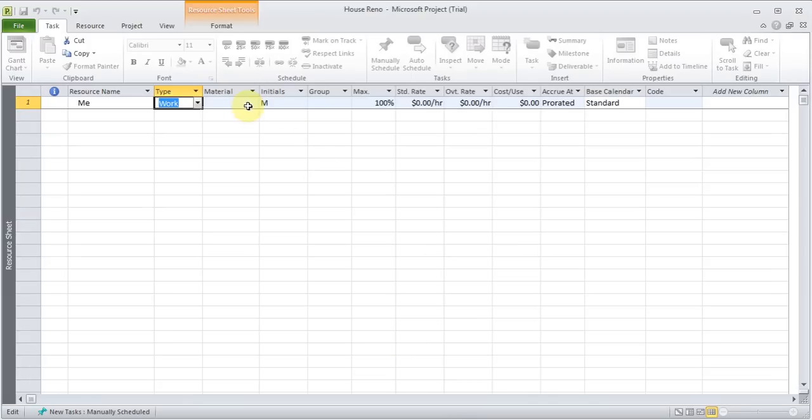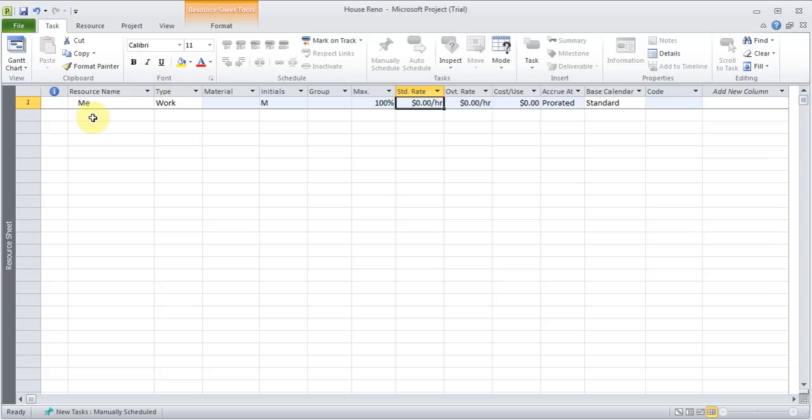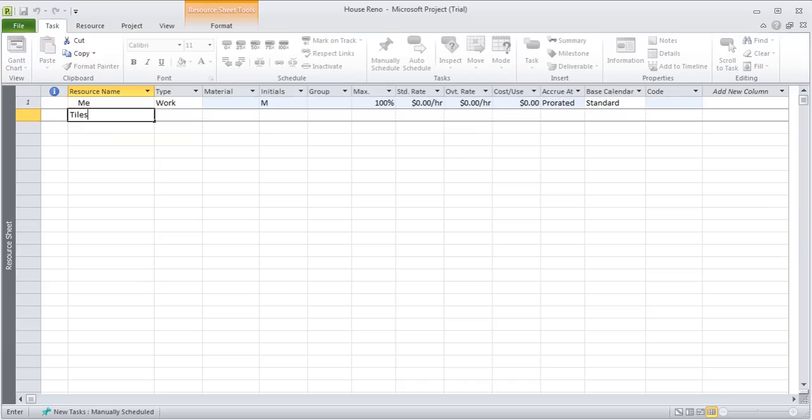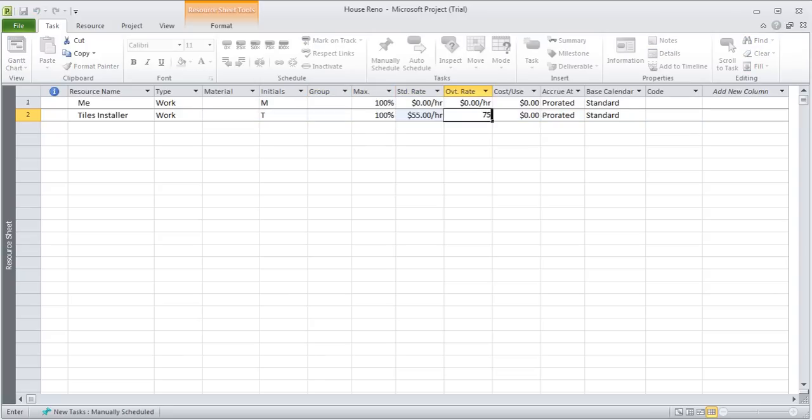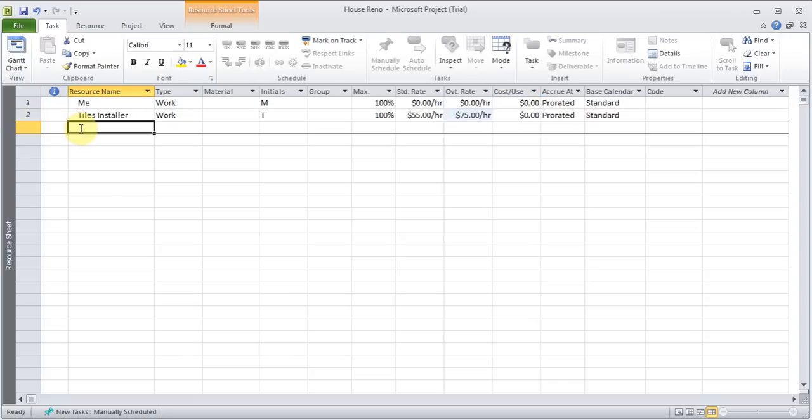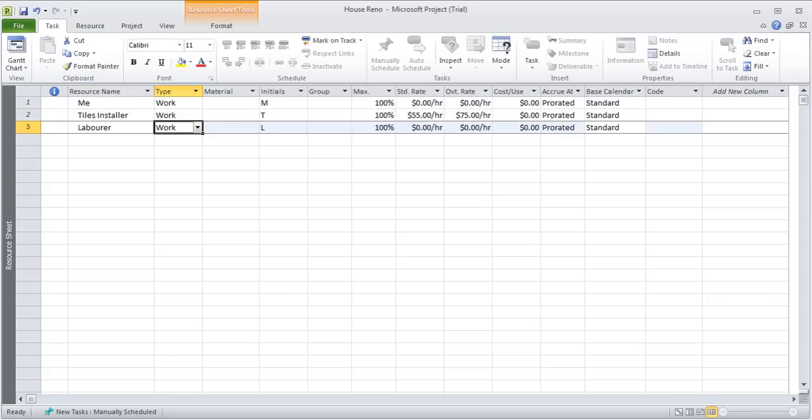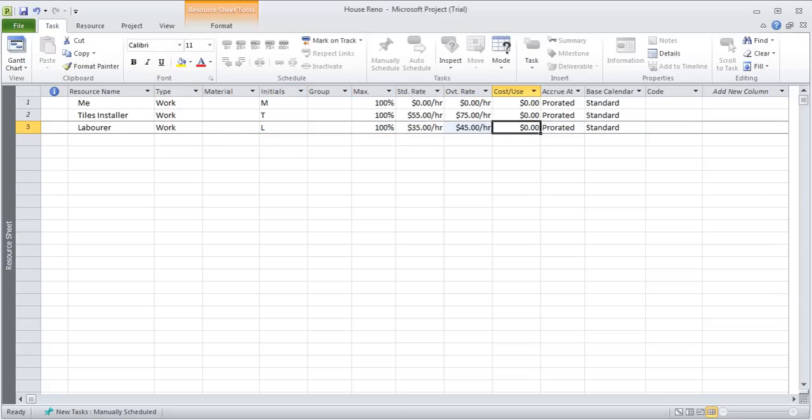Come back. So me, at least for now, I'm not charging myself anything. But if you wanted, you could put something there, so that you know, if you were working somewhere, you would have been making, say, $30 an hour. So you can put that, because that's the amount of money you've not made that day. Say I want to put somebody for tiles installer, which will be work. And his standard rate is 55, and his overtime is, say, 75. I want to put a laborer, somebody I'm going to use to help the tiles guy and also work. And say his rate is 35, and overtime is 45. I'm using the tab keys.